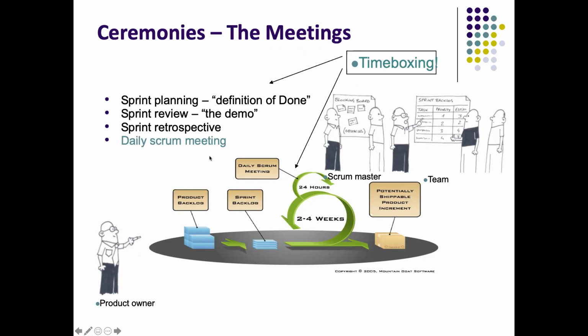After that, you will do a sprint review or the demo with the product owner and sometimes the client as well, right? So at a very high level, it's a meeting where you showcase what you have developed to the product owner. Then, based upon the definition of done, the product owner may accept or reject those deliverables. Sometimes the client is also present, or it's something the product owner can control, whether the client should or should not be present. But this is sort of a presentation or demo to the product owner from the Scrum team. So that too we covered.